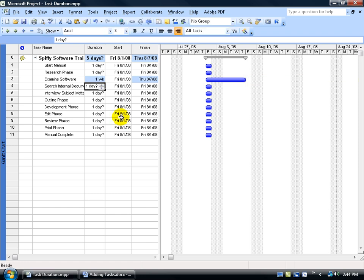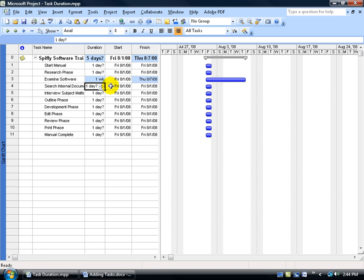Let's get started and start entering in all our duration days for all our tasks here except the project summary task. The reason why is because the project summary task will summarize all the tasks that need to be completed down below. For example, what's the longest task that needs to be completed in order for the project to be completed? Well, it's the examine software. It's going to take one week or five days. That's what it's showing up above. It says five days to complete the project because every other task starts on the first day and will be completed in one day, where this task right here is going to take an additional four days.